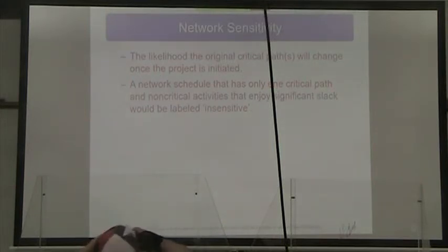It turns out that something that you thought was going to be very hard and is on the critical path turns out to be super easy, and all of a sudden, boom, you got two extra weeks on the critical path. Well, that doesn't mean you got 2 extra weeks, really. It means something else is now the critical path, and you've got to go back and recalculate. I mean, maybe the critical path will be the same thing, and our project is just now 2 weeks shorter.